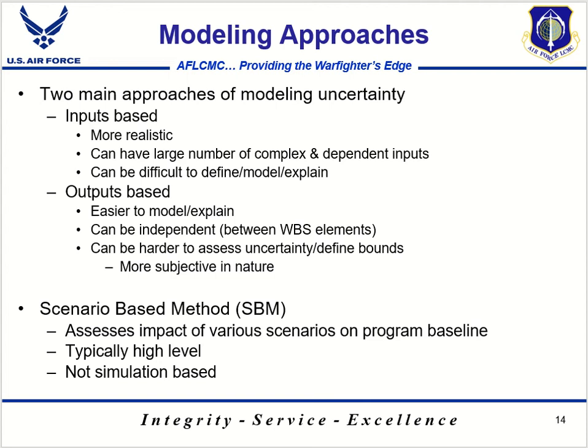An outputs-based simulation is where you assess and assign the uncertainty at the output or at the point estimate WBS total level. Outputs-based is easier to model and explain, but sometimes the uncertainty can be harder to assess at that WBS level. In reality, again, your organization likely has its own preferences or policies about which one to use, so again, you'll need to use that method.